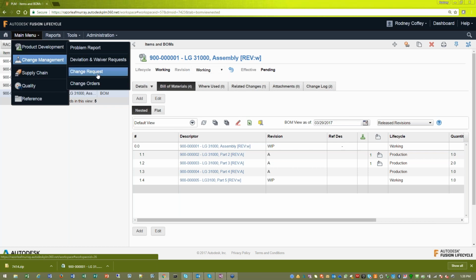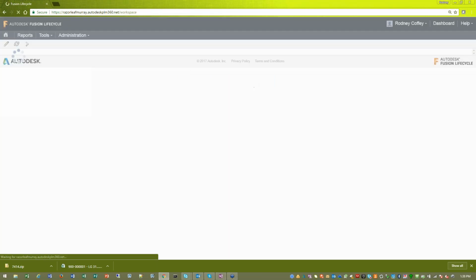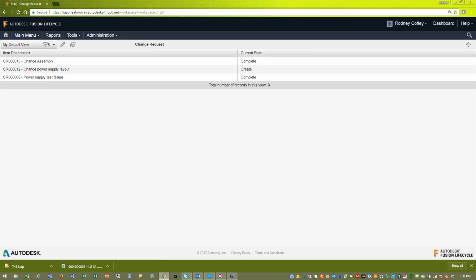So we're going to look at the engineering change request process. So normally, anyone in the organization, from the CEO to the manufacturing person on the floor that's putting the product together, assembling, or the engineers in the engineering department, everyone can create a change request, anyone who touches that product in the organization, right? A change order is typically executed by engineering or the operations team in order to put that change into effect. So they're doing a different evaluation.